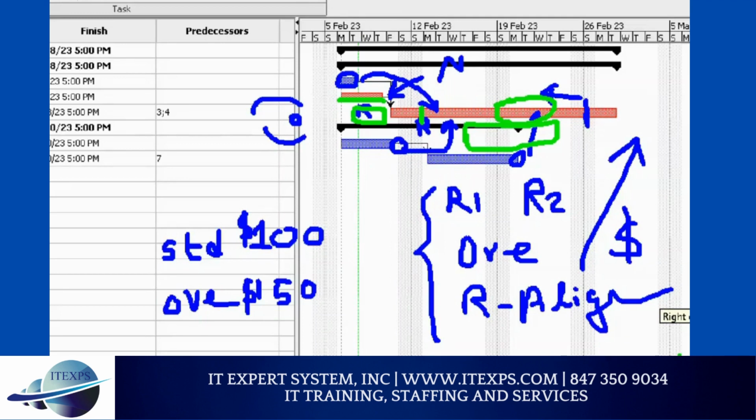So think about resource alignment and resource swapping, for example. The resource you added here, resource 1, is taking 13 days. But you have a smart resource 5. If he works, he can do this in 3 days. So you may swap the resource, because the smartest resource can squeeze this activity. Make sense? So there are a lot of options you have: adding more resources, adding overtime, adding parallel activity, resource swapping. You can squeeze this.